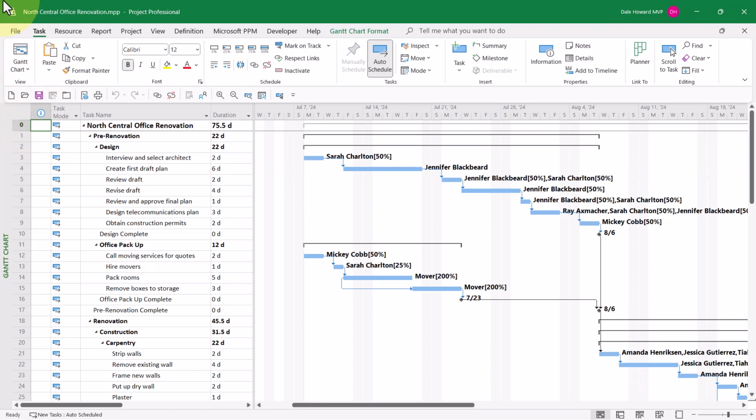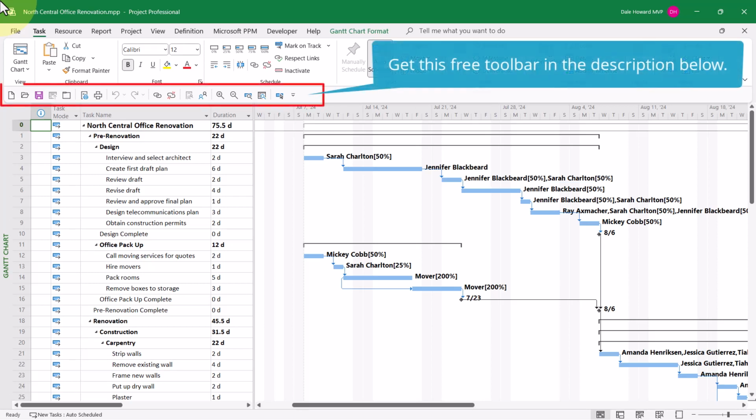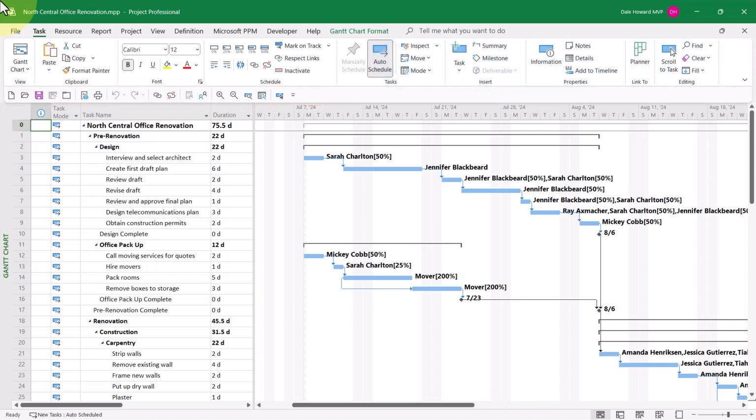The solution to this problem requires 3 sets of steps. The first step in the solution is to create a custom calendar that schedules work 7 days a week and 8 hours a day. By the way, you cannot use the built-in 24 hours calendar for this purpose. You have to create a custom calendar. Here's how to do that.